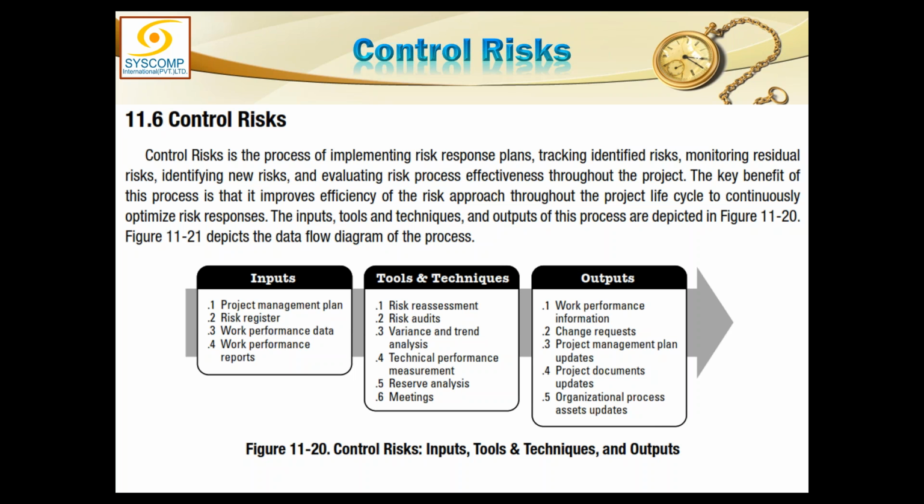Tools: we will have to reassess all the risks. We will do the risk audits. We will do variance and trend analysis, naturally based on the respective schedule management plan and cost management plan. Technical performance will be measured, reserves will be analyzed, and meetings will be held.